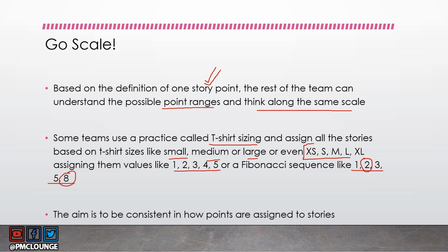The aim here is to be consistent in how points are assigned to stories. That's the whole idea, right? So no matter if you are someone who's very liberal in assigning story points, or someone who's very conservative, everyone should have a broad, similar idea of what story points really mean and what kind of effort story points represent.